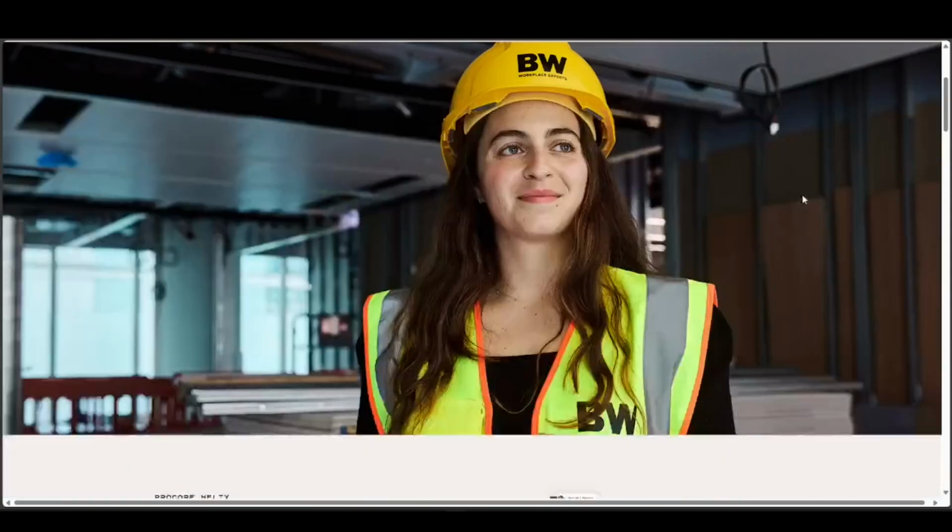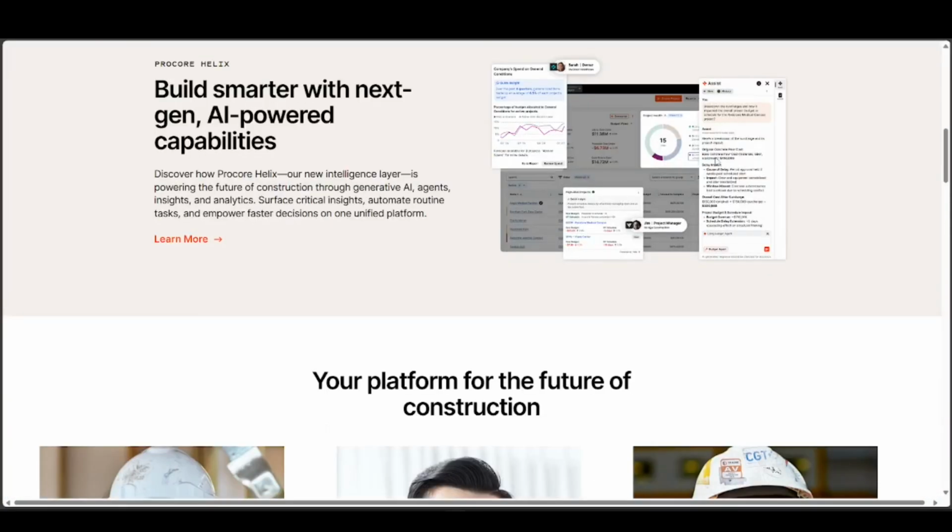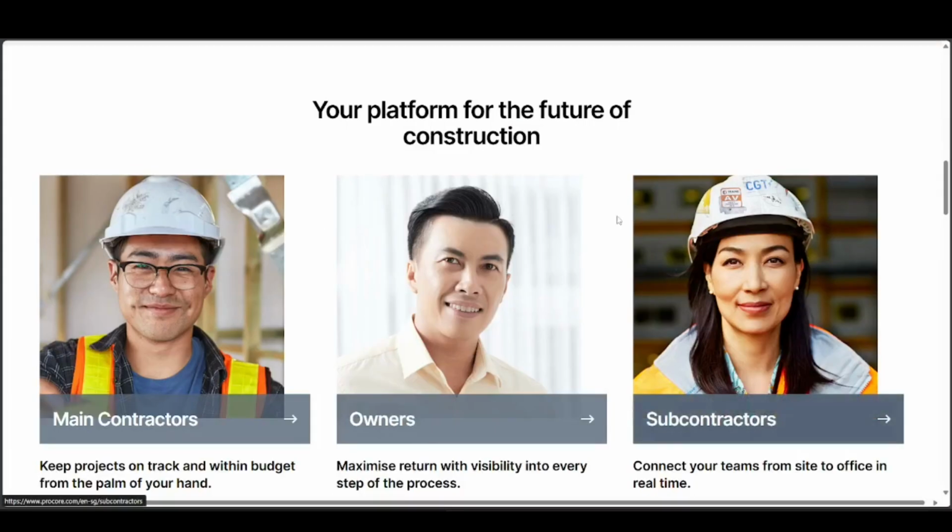You can attach the files and documents once you are there, and then upload PDFs, images, or other required documents. So if needed, you can drag in multiple files to keep everything in one record. You can also assign the workflows like reviewers and approvers, so preparers, reviewer and approver. So set the due dates for each stage to track the accountability.